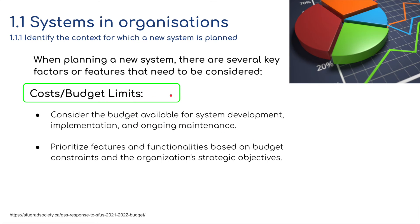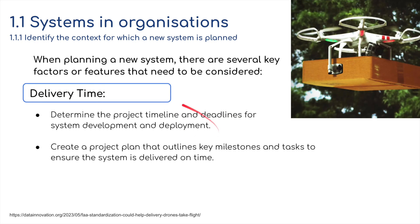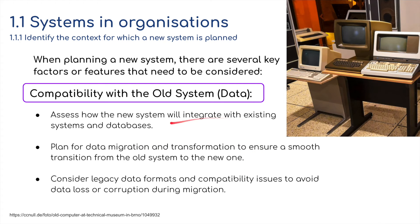There are costs and budget limits to consider. We need to prioritize features and functionality based on budget constraints and the organization's strategic objectives. In terms of delivery time, we should determine project timelines and deadlines, possibly creating a project plan with milestones and an end date. We also need to check whether data on the old system is compatible with new software — for example, will something created in Microsoft Office 2007 work with Office 2023? Will there be problems with macros and essential tools used in the past?